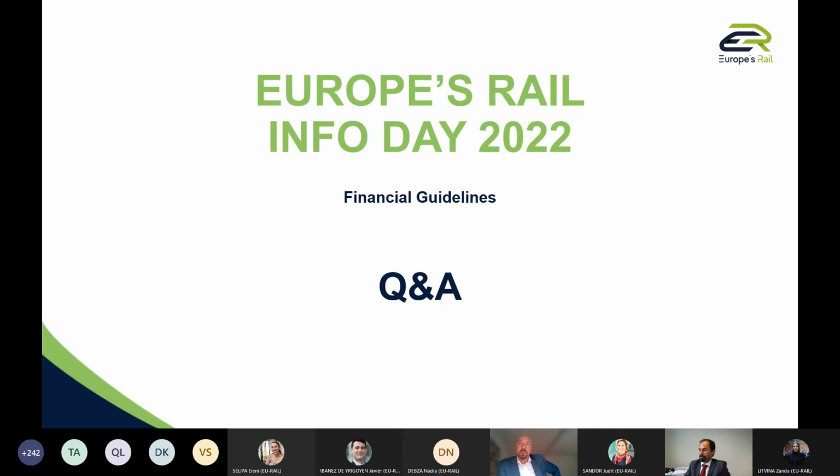in this part we enter into your own accounting practice. So the interest of lump sum is that, as I first presented to you, if you are aware of how it was for Horizon 2020, how the processes are in place for the calculation of personnel cost, with a daily rate and so on, you take this methodology into consideration, you implement it with your own accounting practice, and you calculate the person months in the financial Excel table accordingly.